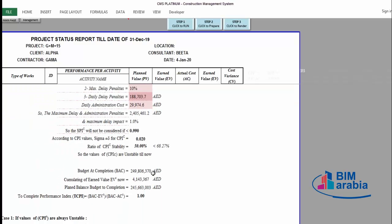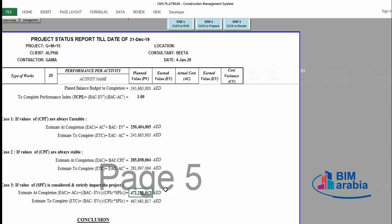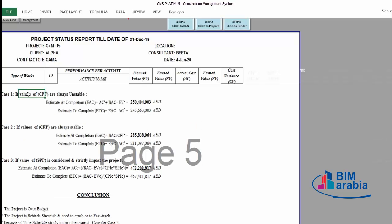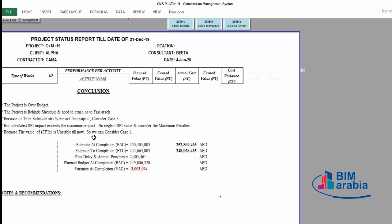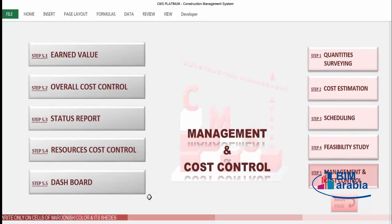Accordingly, CMS neglected the SPI of 0.6 in this case. Yes, the project is impacted by the time schedule, but using the SPI is not logical here as it would give an unrealistic project cost. CMS already neglected it and used case 1 instead because the CPI is considered unstable with no prior reference months to compare. If we had more reference months, CMS would compare all the CPIs and determine whether the CPI is stable or not, and choose accordingly. Now we have the full conclusion and report from CMS. The next video will explain how CMS gives you cost control for each resource in the resources cost control. Thanks for watching and see you in the next video.